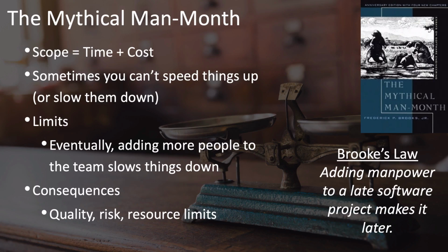You might think that this would reduce the time it takes to complete the project. However, by having your team work longer hours, you increase the chances of them introducing quality problems, bugs into the system that could take you longer to resolve and fix, both in the short run and in the long run, than the time you think you're going to save. Or you may be able to finish the project a little faster, but you may have a lower quality product when all is said and done, and it may cost you more to maintain and enhance that product later.